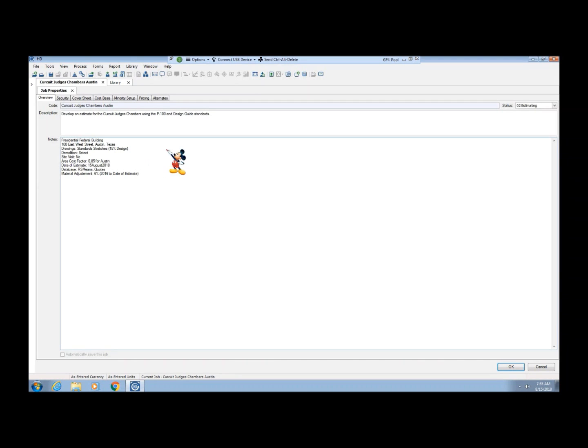After you do your estimate, you'll have an idea of how long it's going to take, whatever method you use, either by the dollars or labor hours or however, but we document that. We'll document the productivity. If a project is a new construction, your productivity is going to be pretty high.